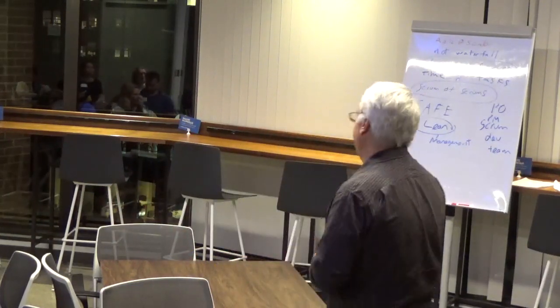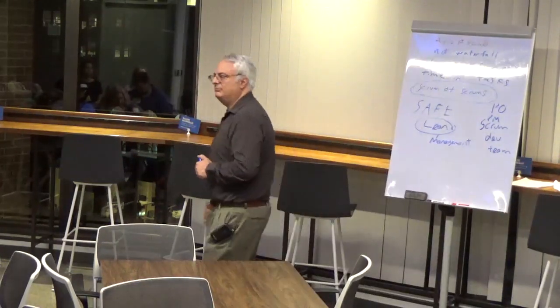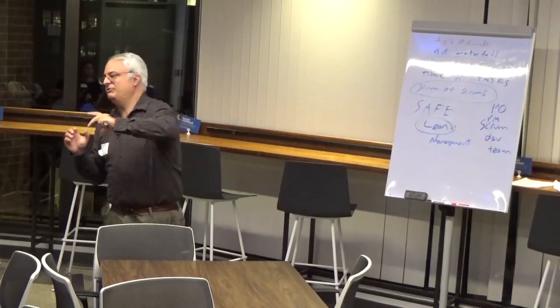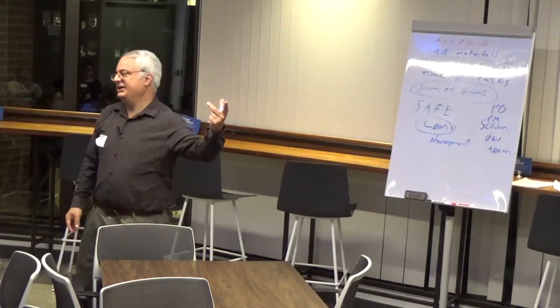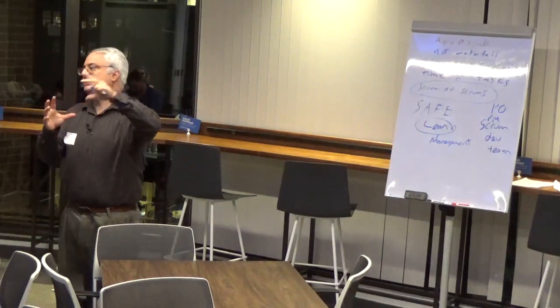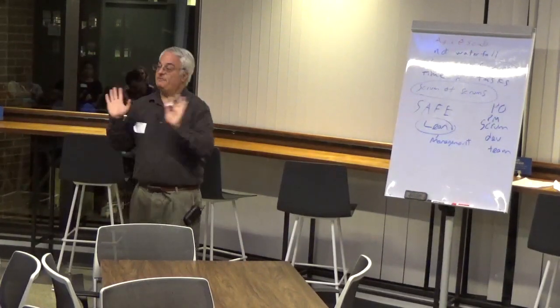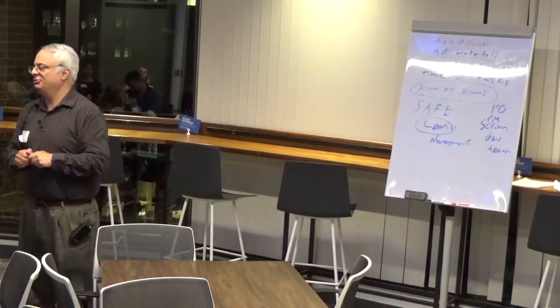The product manager's job is to worry about the roadmap overall. Obviously he works with the product owner on this, but he sort of owns the high-level roadmap the CEO wants. He also talks to customers a lot, but also deals with creating the marketing content for the next release. He worries about the release, whereas the product owner worries about the sprints. Does that make sense? I'm not saying any of this is perfect. I'm just saying this is how SAFe defines a product owner versus a product manager.